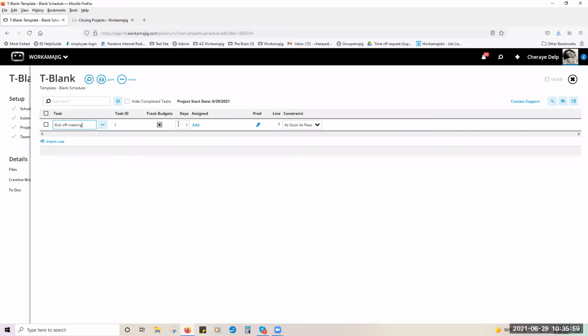Okay, the next tab next to that is the days column. The system is always designed to set up for 1 day. So we schedule in days and we assign in hours. So you have a general idea of how many days it should take to get a step done, or, in this case, the tasks. You're going to hear me call them both ways; they're one and the same.